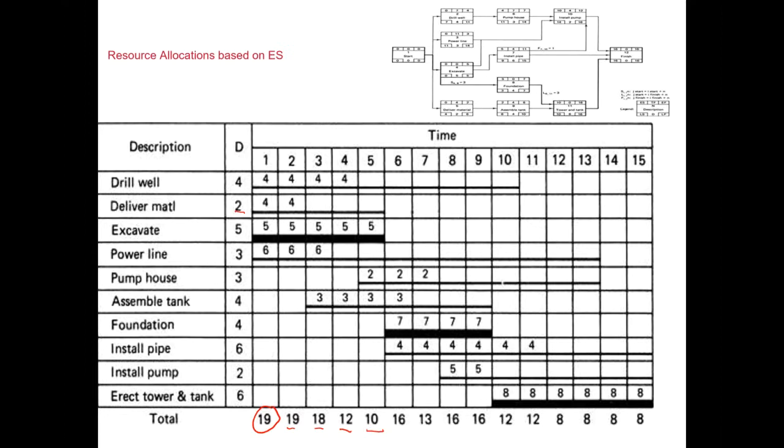Right. So usually this sort of arrangement where there's too many peaks and troughs is not seen as a good resource profile. In an ideal world, we would like to work with the same number of workers. Maybe, for instance, we take a balance of 13 workers and use the same resource throughout the project, but that may not be the most efficient manner, or that may not be possible. Nevertheless, we will try to achieve a resource profile which is closer to the balanced one.